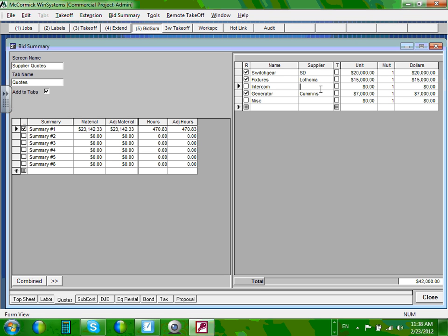This is very important because that's what you guys are going to have in yours too. How do we get these numbers, Ashley? Remember that lighting schedule, guys? Your lighting schedule, you send it to 4 vendors of lighting. At the last minute before the bid is due, they will send you 4 quotes. And you pick, most of the time, not all the time, the cheapest, and you plug it in here, and you write the cheapest one from Square D.